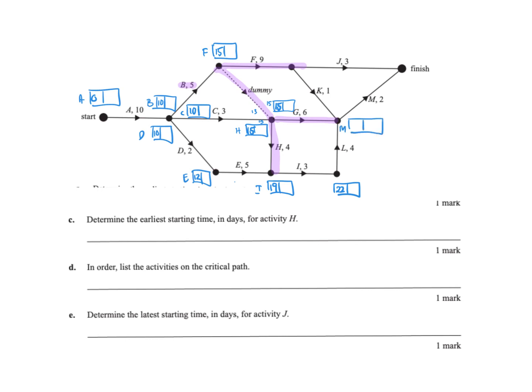So if I was coming in the L way, I'd be sitting at 26, but I just better check the other ways. If I came in from G, it'd be 15 plus 6, which is 21. And if I came in from K, K would be the 15 plus the 9, so 24. And then if I came into M from K, it would be 25. So 26 is the biggest. So I'm just going to rub out those ones.